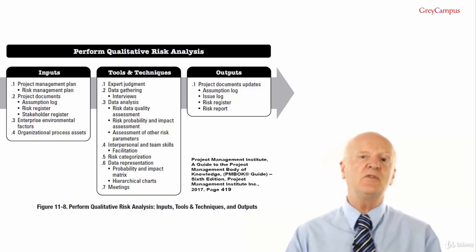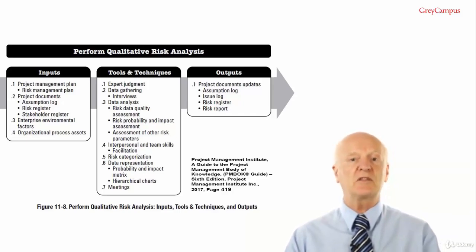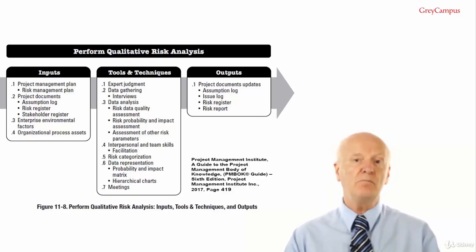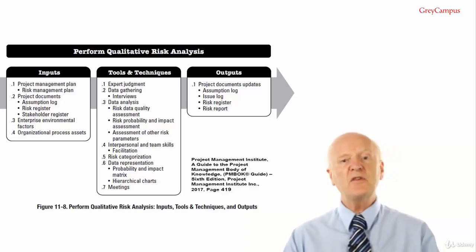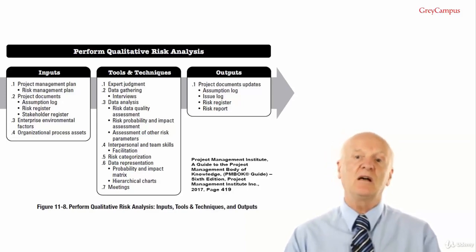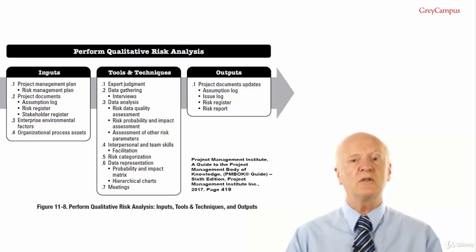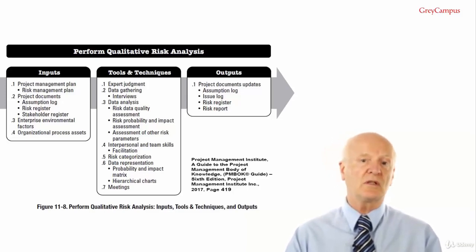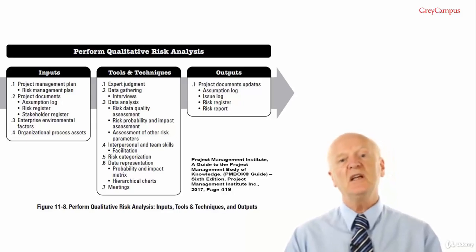Risk can be assessed in interviews or meetings with participants selected for their familiarity with the types of risks recorded in the risk register. Project team members and knowledgeable persons external to the project team are included. The level of probability for each risk and its impacts on each objective are evaluated during the interview or the meeting. Differences in the levels of probability and impact perceived by stakeholders are to be expected, and such differences should be explored. Explanatory detail including assumptions justifying the levels assigned are also recorded. Risk probabilities and impacts are assessed using the definitions given in the risk management plan.